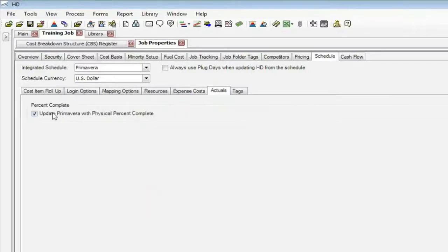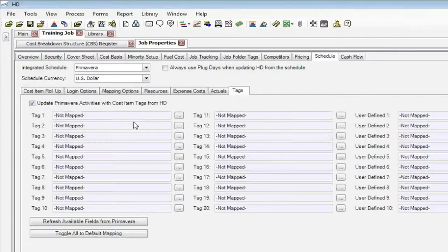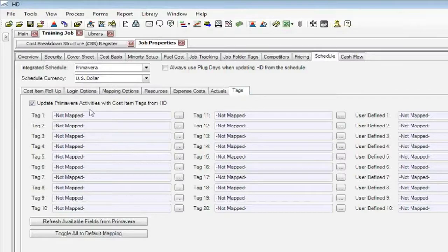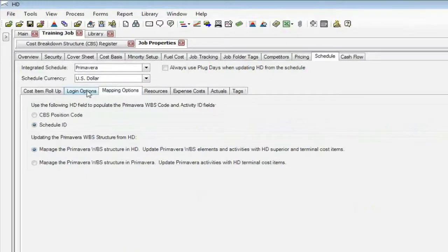Actual. In Hard Dollar, you can set up a percent complete. In other words, on our job tracking, we know what the percent complete is based on your quantities. We'll send that out to Primavera if you want. Hard Dollar has tags and user-defined fields. We can map those to Primavera's activities if you want to. So it's a lot of information we can set up for you for Primavera.